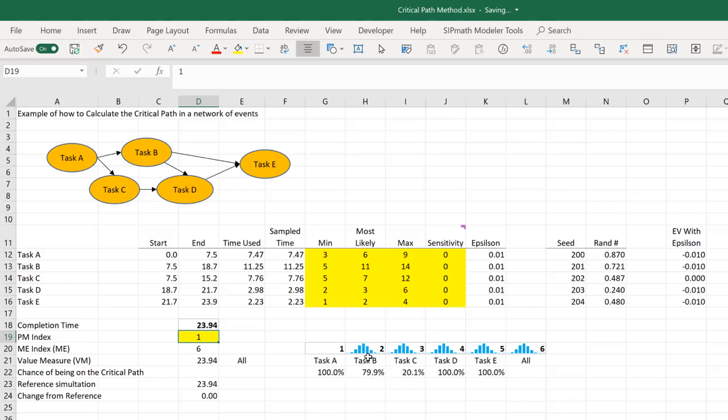And so if we look at this diagram and think about it, since task D requires both B and C, the critical path is going to be through B or C.